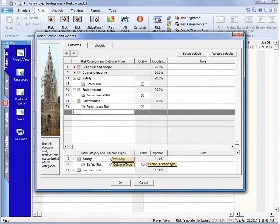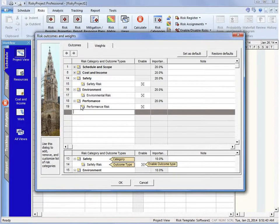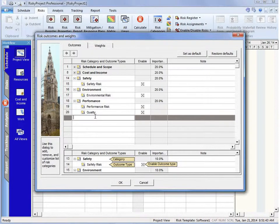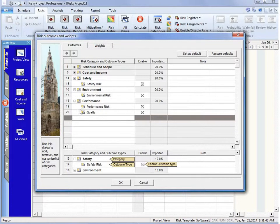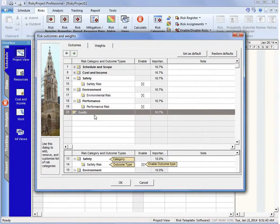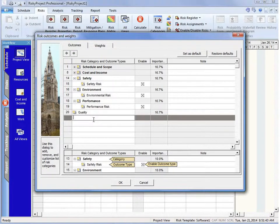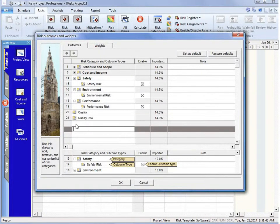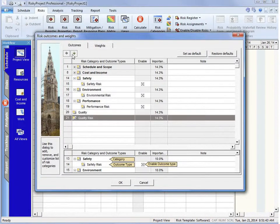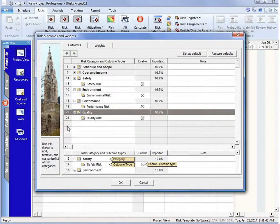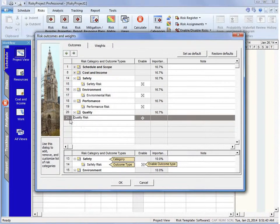Now, if we wanted to add a risk category, we'll put quality back in. So first of all, we're going to add the category. And I'm just going to indent it, and that turns that now into a category. And then I'm going to say quality risk, and then I'm going to outdent that. And now we've created a risk category and the outcome.